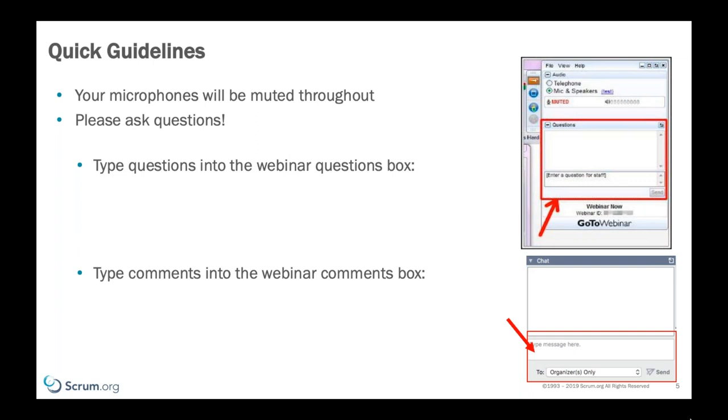Build that report. If you can build part of that report first, only pull the data you need for that report. So you're thinking about the overall architecture that you're going to need, but you're focusing on delivering the minimum amount of effort to get the outcome of getting that report in front of the users so they can tell you whether it's right or wrong or not fast enough or not delivered in the right way, and you find out that stuff early.